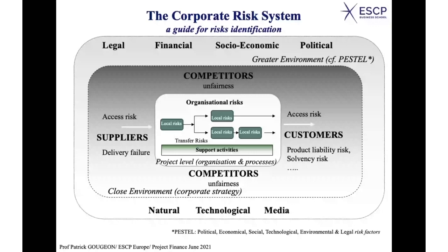You also have what we call here natural risk, which comes from, for instance, an earthquake or floods or storms. All these elements related to the impact of a natural event have to be considered, particularly today because of climate change and the increase in frequency of storms and the like. For certain types of activity, it is very important to look at where you locate your project. The location is now more and more important.